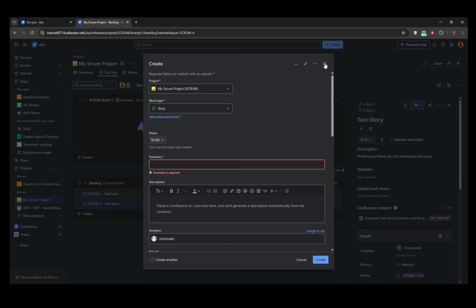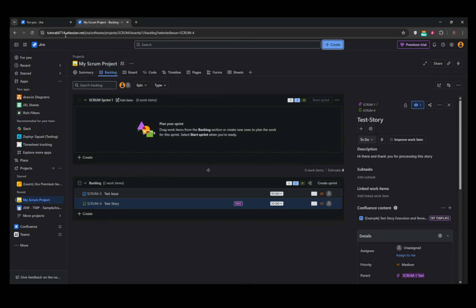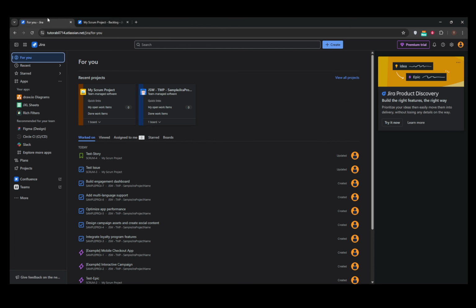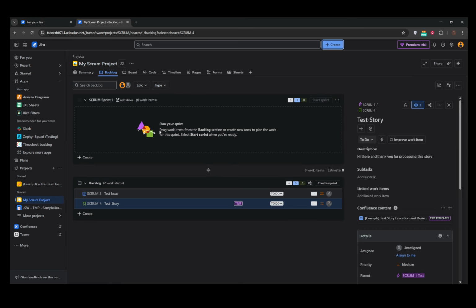Begin by opening the issue view of this story, which will serve as your parent issue. Within this view, you'll need to locate the option that allows you to add a subtask. This is where we need to consider whether you're on a team-managed or a company-managed project, because each type has a slightly different approach. For a team-managed project, look for the Add Child Work item under the Issue Summary. This is the feature you'll use to add a subtask.